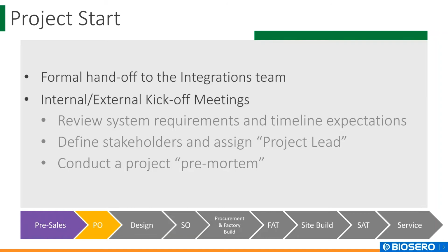During the internal kickoff meeting, the different Biosero teams meet and discuss the project. We outline system requirements and timeline expectations. We also identify key stakeholders in the project and assign a project lead. The project lead is the Biosero team member who will handle the technical details on every step of the project from development through delivery and training. The project timelines are then managed by our PMO from a higher level.